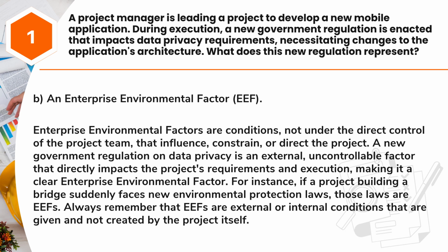Answer: B. An enterprise environmental factor, EEF. Enterprise environmental factors are conditions, not under the direct control of the project team, that influence, constrain, or direct the project. A new government regulation on data privacy is an external, uncontrollable factor that directly impacts the project's requirements and execution, making it a clear enterprise environmental factor.